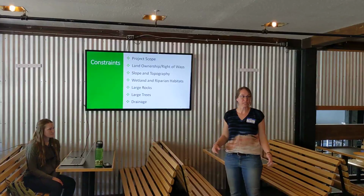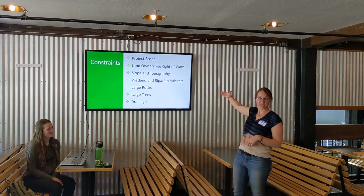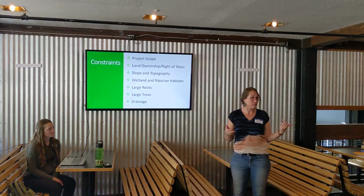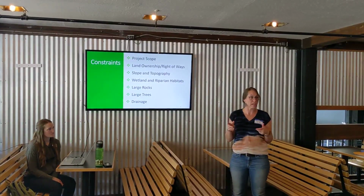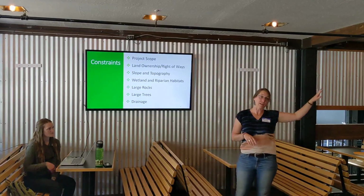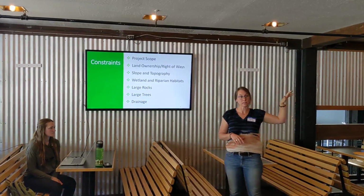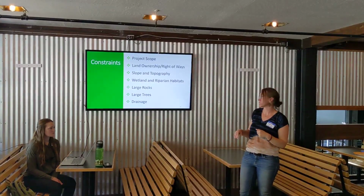Yeah, so I have the fun job of telling you guys what we couldn't do on the site because of all these constraints that we ran into. Since we had this last meeting in June, we had a big snow year, right? And so we didn't have snow melt out until end of July, August. So it was around that time that we were actually able to get out there and survey. So we were able to get topography data, figure out what's happening out there, and that dictated a lot of what we were able to do and the results of what you're going to see.